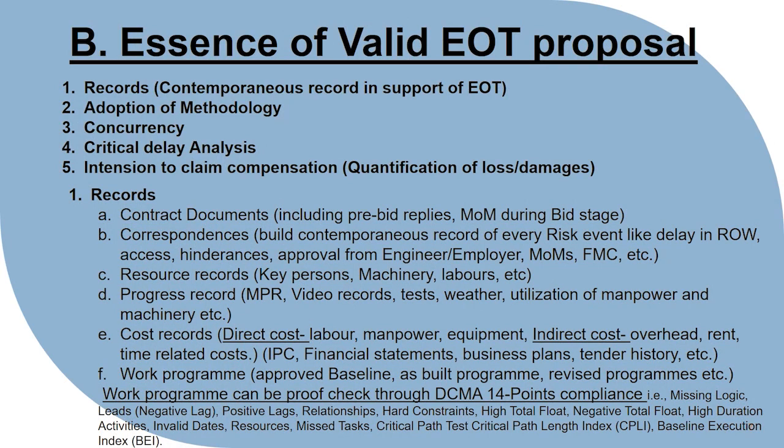The extension of time proposal shall be supported with proper records and backup. The burden of proof is always on the party who is requesting the relief. Hence, the contractor shall generate contemporaneous records during the execution phase. The contractor shall record all the delay events by means of correspondences. Correct methodology shall also be adopted while performing the delay analysis, which we will discuss in the upcoming slides.